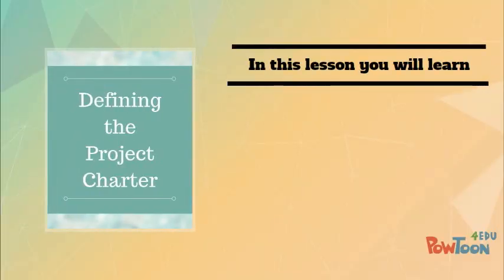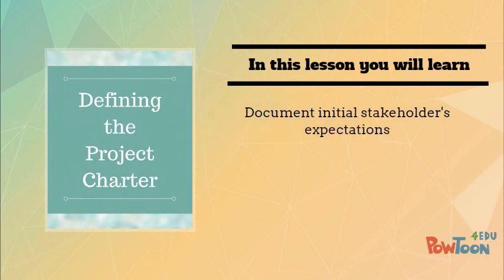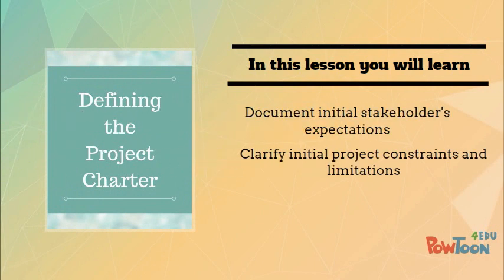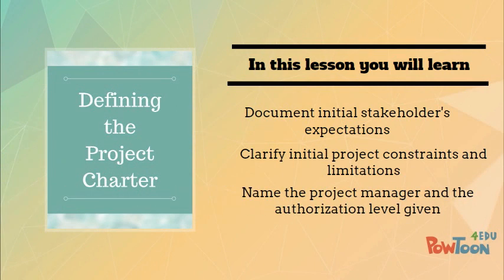A project charter establishes the beginning of a project, and it has three main purposes, which are to list stakeholders' expectations for the project, clarify any constraints and limitations, and to name the project manager and list the authorization level given to them.